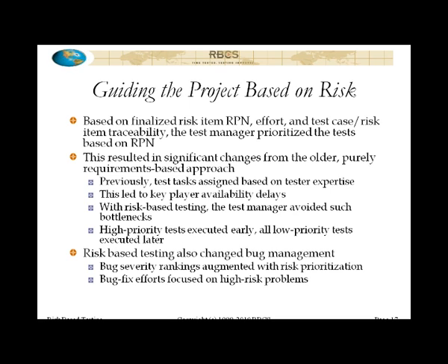So the insight that Jim got from this risk-based testing was, well, don't do that. You want to sequence the tests based on risk, and look for some ways to get more creative about who runs what when. That then changed the way that the tests were run, and the higher priority tests were run much earlier, lower priority ones later, with a consequent effect on bug finding.